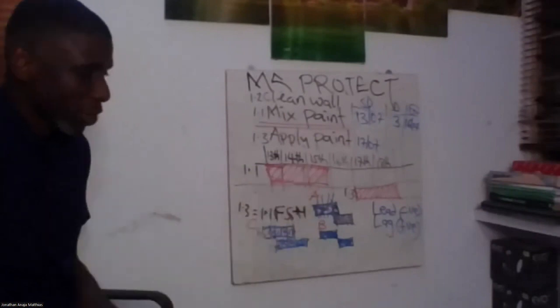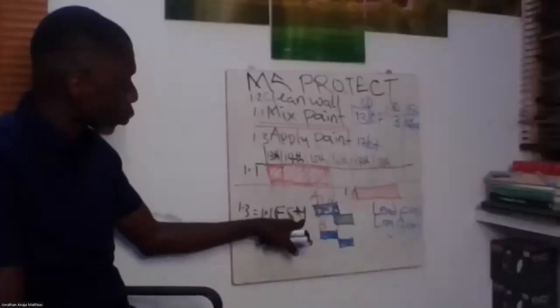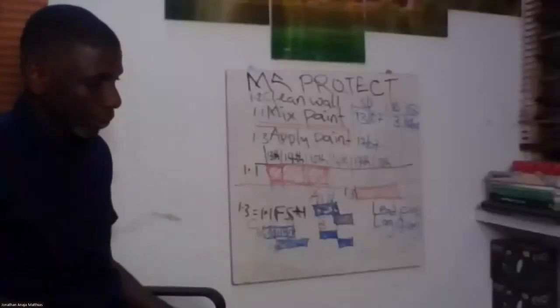I have changed -1 to +1. If you do that on MS Project, what do you think will happen to the bar? The bar will move forward. The second bar will move forward. That is a delay.